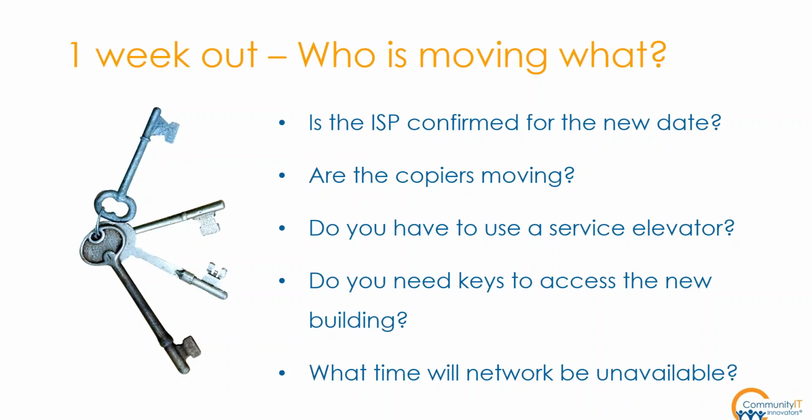And I think something I would add is often when is the network going to be unavailable? In our experience, whatever time you set, someone will ask for 15 more minutes twice. So it's good to tell everyone the servers are going down at 5, but expect it to really be 6. Yeah, people will always ask for an extension.